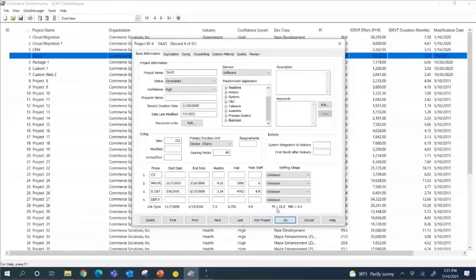And it's also broken out by complexity. So for example, if you're building engineering systems, you're doing well if those PIs are in the 5 to 10 range. For folks that are building business applications, more straightforward types of web development, IT infrastructure, those PIs tend to be higher just because some of those examples are less complex. They're a little bit more straightforward.